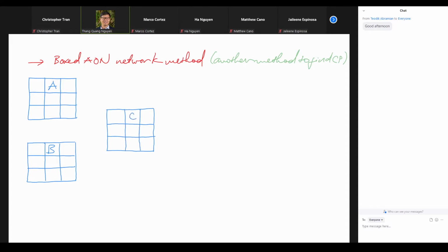So that is sending out the invitation cards, right? Remember, to send out the invitation cards, we have to know the date. So there's one arrow going from A, and we also need to know the location. So there's another arrow going from B to C. And then next, we need to choose an entertainment company.